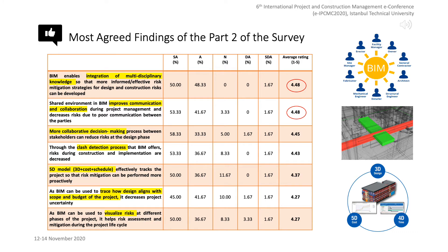In order to realize risks before construction or implementation, clash detection features in BIM may be beneficial. From the findings of the survey, it has been concluded that the clash detection feature, which is often used in most BIM applications, is important for managing risks, especially during construction and implementation. Another issue relates to the contribution of time and cost factors integrated in 3D models. 77% of the respondents agreed that tracking through 5D models would enable risk mitigation more proactively. Most of the respondents expressed that risk visualization through BIM at different phases of the project may help risk mitigation and assessment during the project lifecycle.